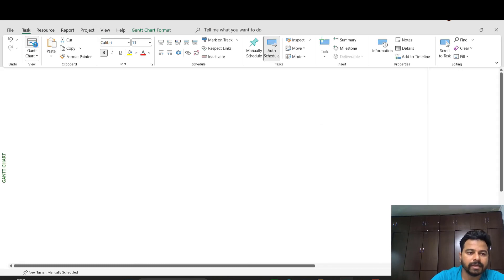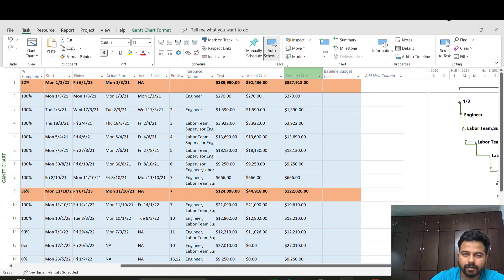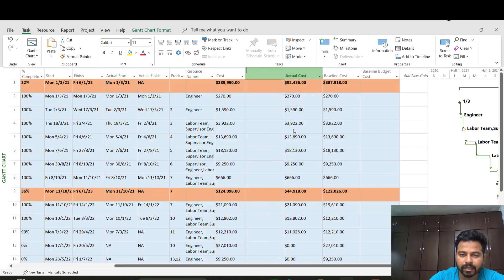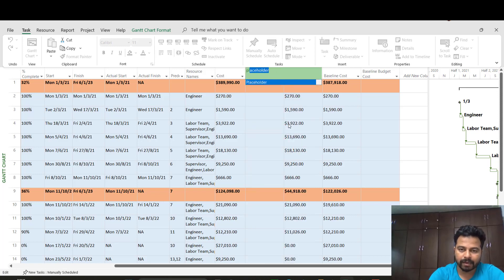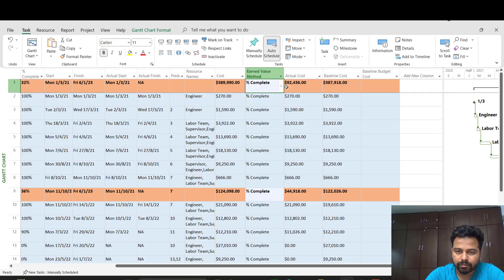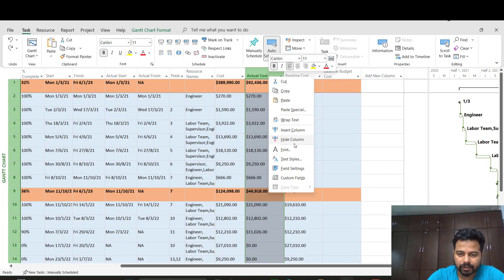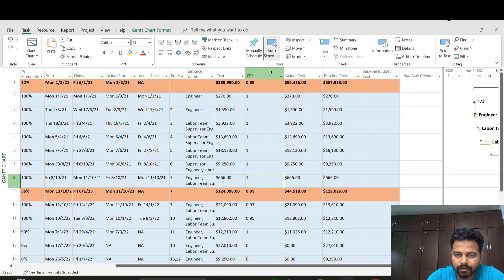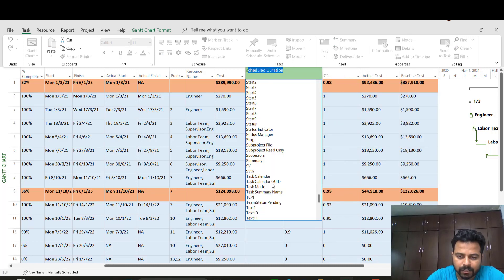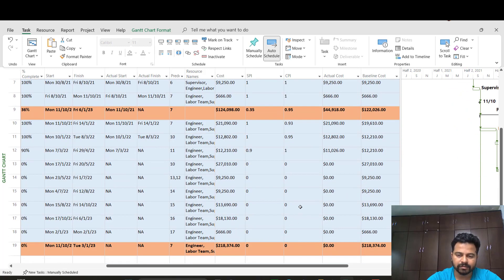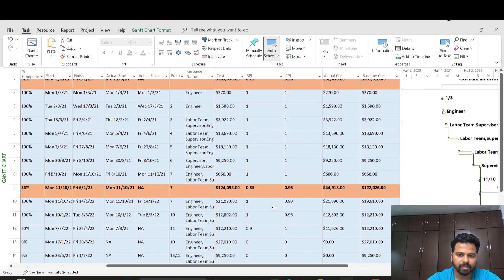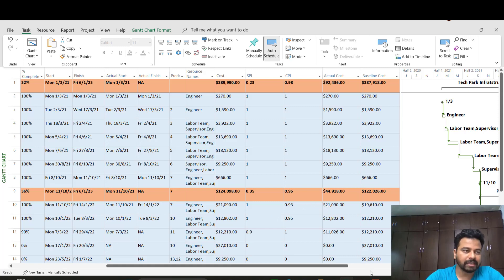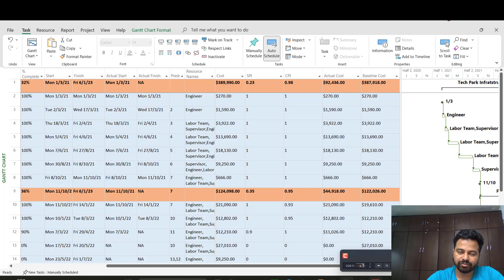So coming back to the task Gantt chart, our actual cost is this one. Then we can also include the Earned Value method, which is percent complete. We can include the CPI cost performance index, SPI, schedule variance percent as well. So this is how we can now do the EV analysis in Microsoft Project. Hopefully I was able to go through all the details and I believe you have learned everything related to the EVM and the easiest way to do it in Microsoft Project. Thank you.